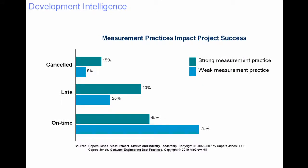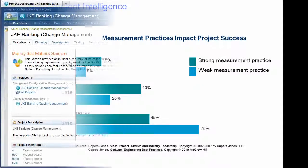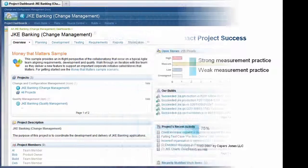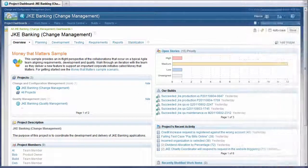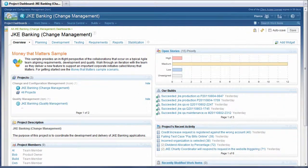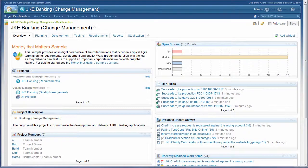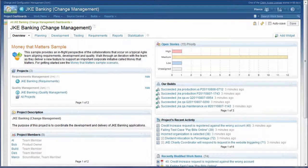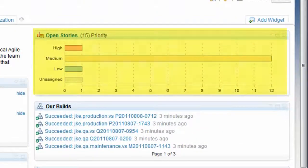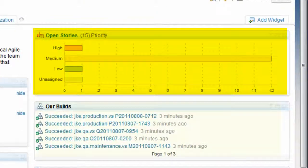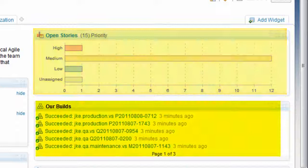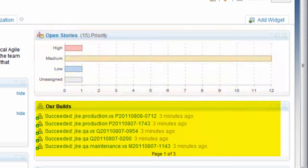Dashboards function as information radiators, a large, highly visible display used by software teams to track progress. As information radiators, dashboards provide one place to see the health of the entire project.